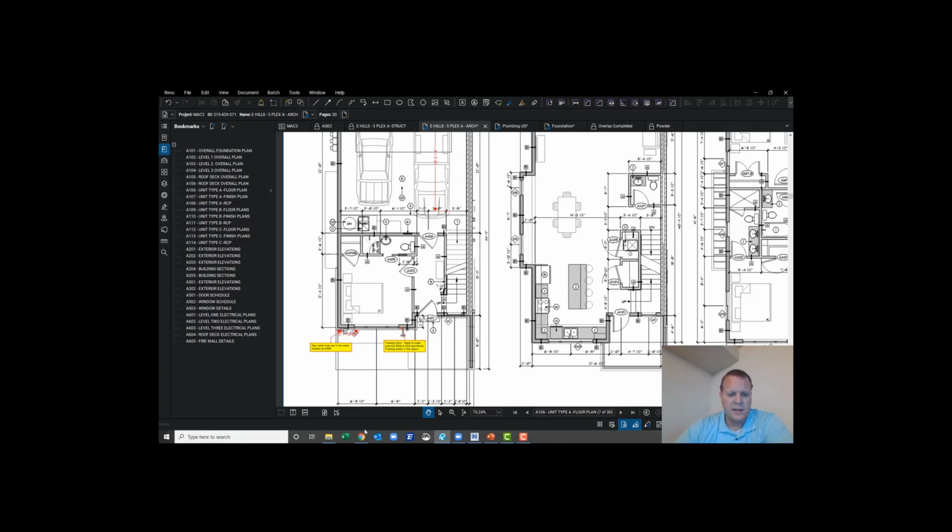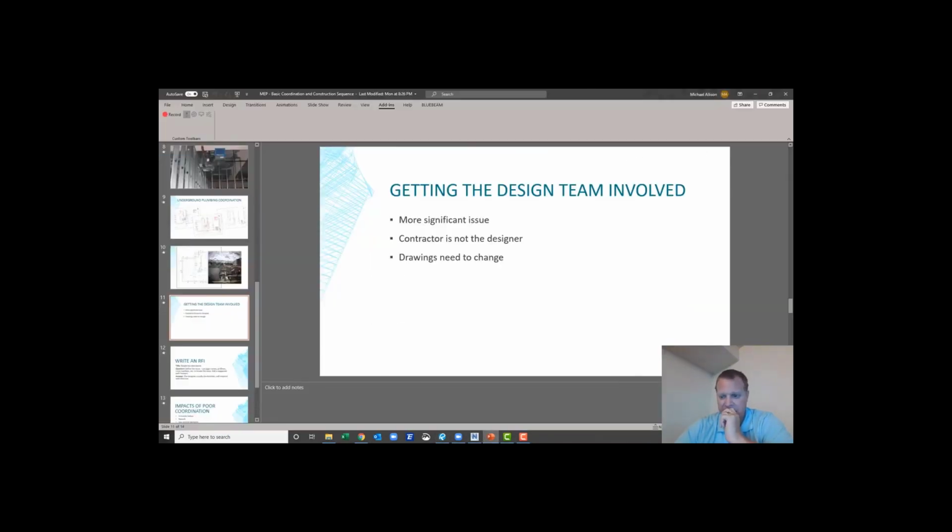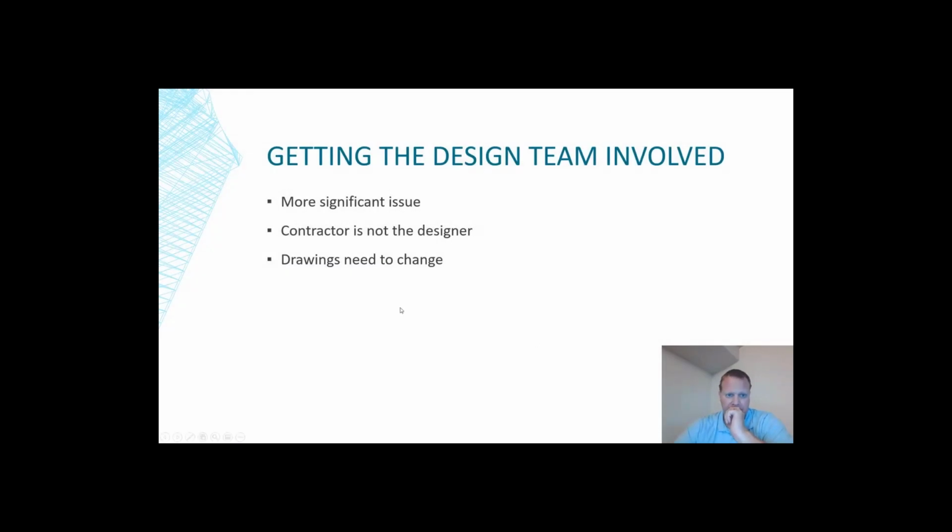All right, let's jump back into my PowerPoint and see if I missed anything. I talked about this a little bit, that we might have to get the designer involved. It's a more significant issue. The contractor is not the designer. That's something I didn't say, but sort of mentioned when I talked about the litigious nature of things. If I went out there as a site supervisor and decided I'm going to move the pipe over here or move the footing, that's not my job to design it. So that's one of the reasons I would recommend an RFI.